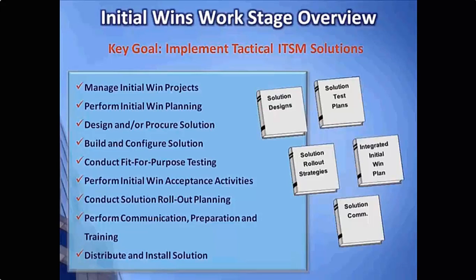We'll perform some initial win planning, design or procuring a solution, building and configuring that solution, conducting fit-for-purpose testing, performing initial win acceptance activities, conducting solution rollout planning, communications, preparation, and training, and then finally distributing and installing the solution.